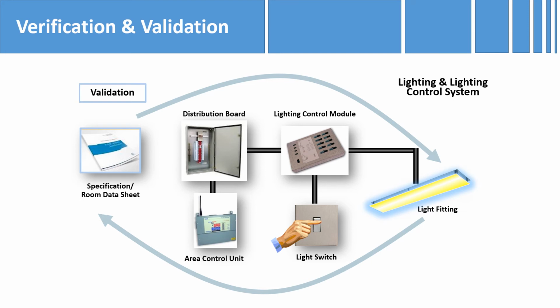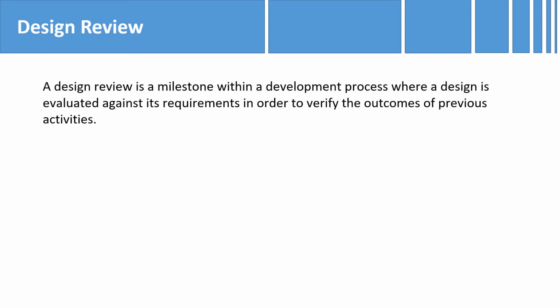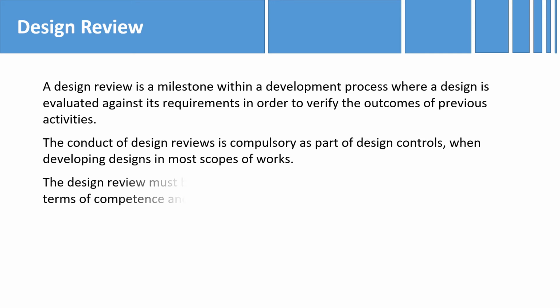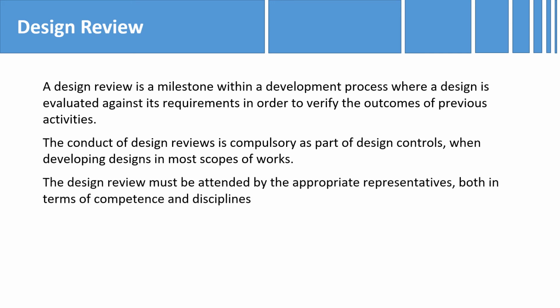A design review is held at milestone stages within the development lifecycle, and this will be carried out against the technical requirements. Design reviews are compulsory when developing MEP designs, and like the technical risk assessments, they must be attended by the appropriate personnel, both in terms of competence and the disciplines involved.